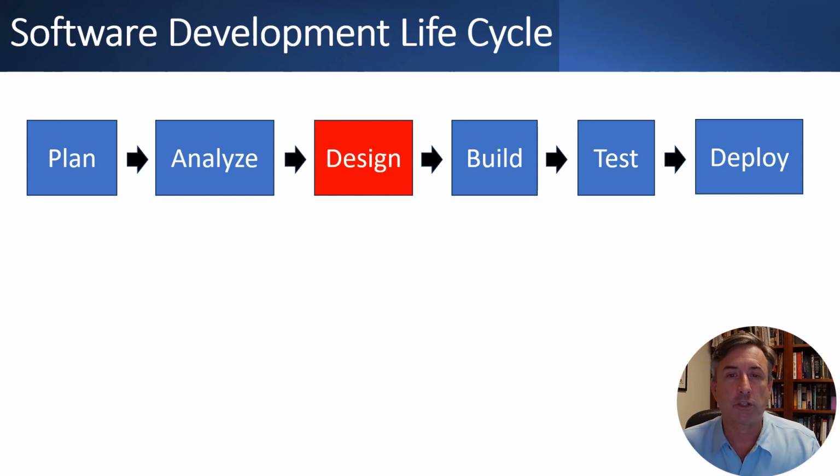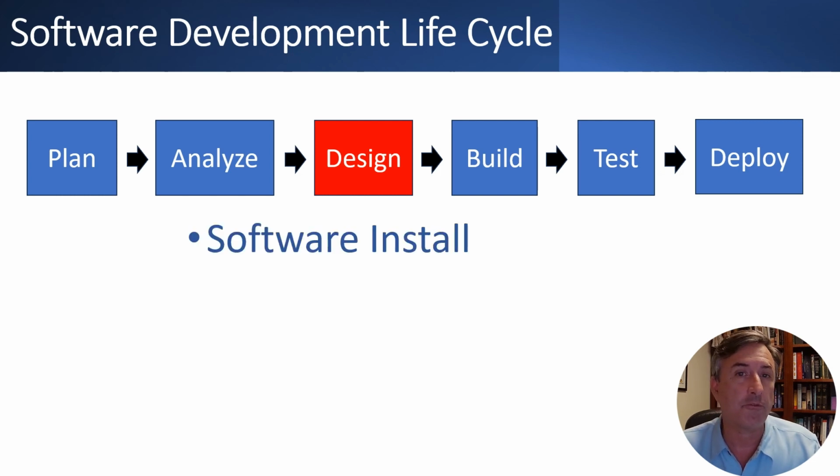If you are building from scratch on a large project, the main deliverables are, first, you must install the software if you're purchasing software off the shelf. So the software vendor and perhaps a supporting contractor who's an expert in the software will join the project now that the contracts have been signed. And they will have a series of questions that will need to be answered to perform the initial install and setup of the software so that detailed configuration can start in a later phase.